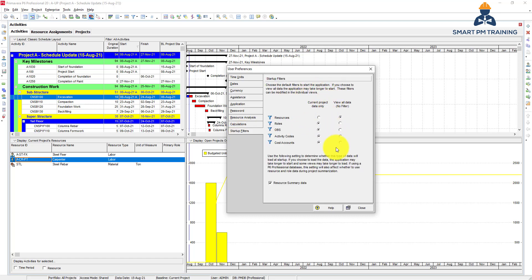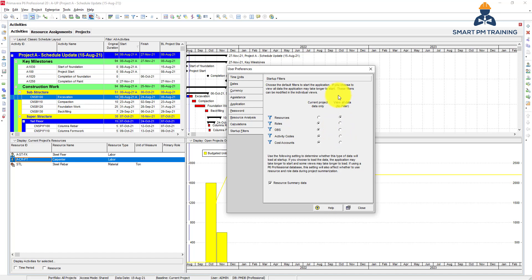Startup filter. So when you open the application, by default it will show you all information related to the current project data. But for view all data, it will have everything in your Primavera database, like all projects closed or open. So it tells you here that if you choose to view all data, the application may take longer to start because it's loading the data right now. So always keep it as it is. For the resources also, you want to use all data only for resources, because sometimes when you assign the resource, you want to select from global resources.